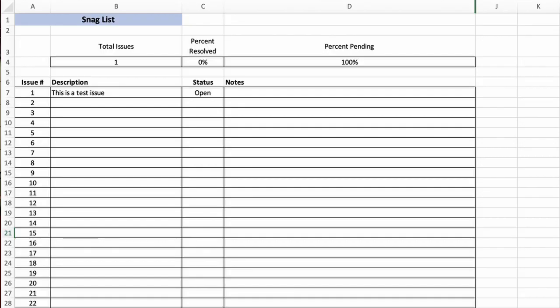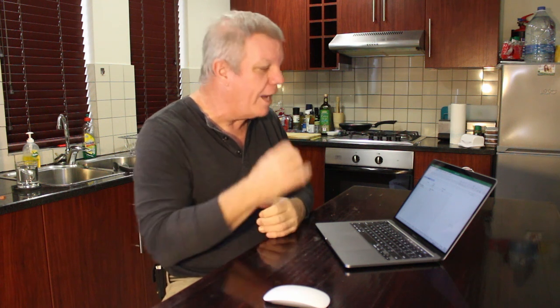When you're done with all your testing, you'll come up with a list of issues — some people call it a punch list, others call it a snag list. Make a list of everything you find during your test process, then go through it with the people selling the boat to you. Either negotiate a discount for you to fix the issues yourself, or have them fix things on their dime. A detailed list of everything wrong during testing will go a long way to help get the boat properly turned over. That's the test plan — we look forward to seeing you next time.